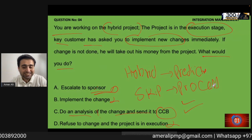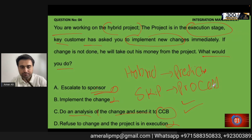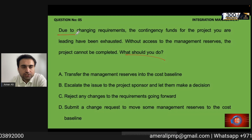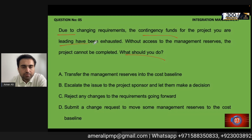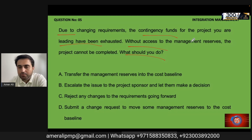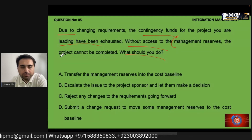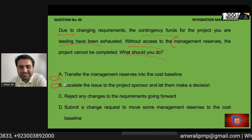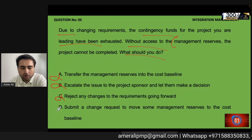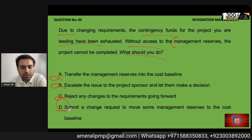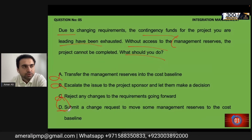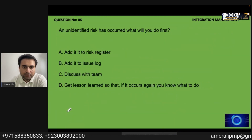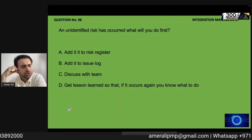Question: Due to changing requirements, the funds have been exhausted. Without access to the management reserve, the project cannot continue. What should you do? You cannot transfer funds directly, escalation is not appropriate, and you cannot just require the change. The answer is to simply raise a change request following the proper procedure.